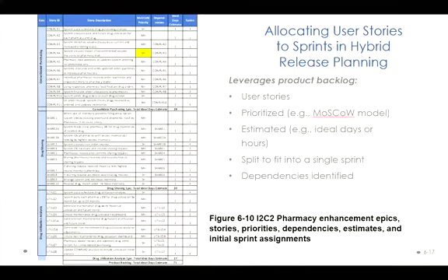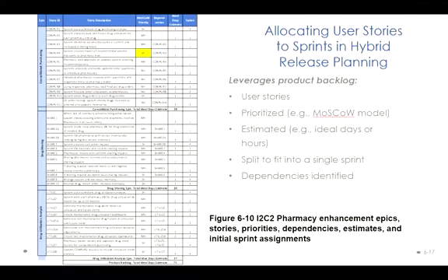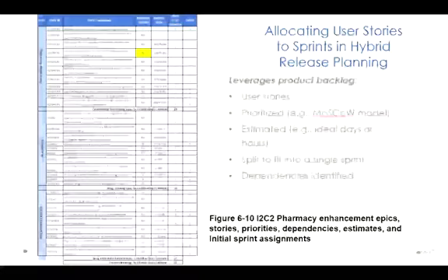A typical management method, even in some of the tools that we have learned or examined in this course, such as IBM DOORS, that requirement management tool, usually will give you some tabular format of a project management plan, allowing you to list the requirements in terms of user stories, or simply call them requirements, and the person who is responsible for the requirement, and their prioritizing rank.